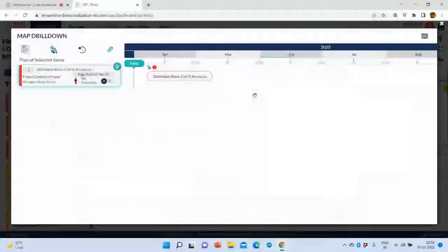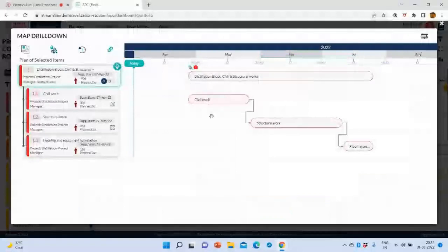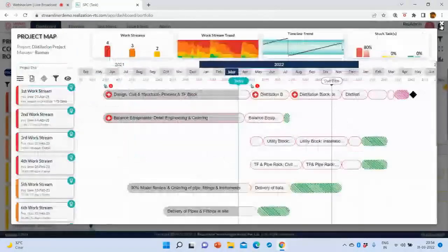What do I mean by managing an integration point? If the contractor starts the work before all that engineering is done, then in structural work, it might have to wait after civil works is done because the structural drawings have still not arrived. So we are avoiding that by making it a clean handover.